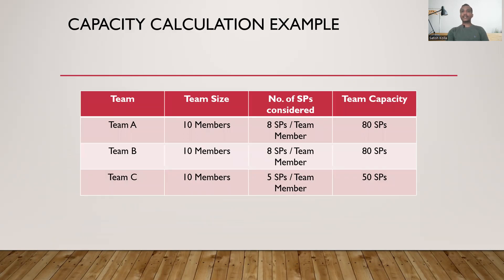How does the capacity calculation look? Let's suppose we take three teams of 10 members each. For team A and team B, we consider 8 story points per team member — so 10 members times 8 story points equals 80 story points capacity. Team C, being a brand new team where the technology, domain, and tools are new, may consider only partial capacity — for example, 5 story points per member, giving team C a capacity of 50 story points for that given sprint.